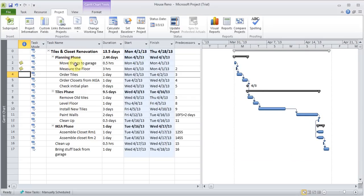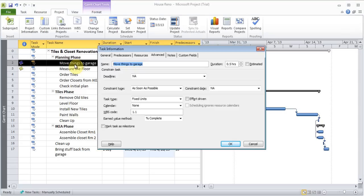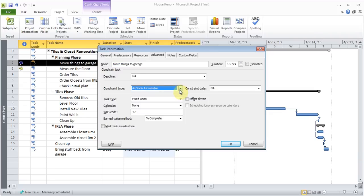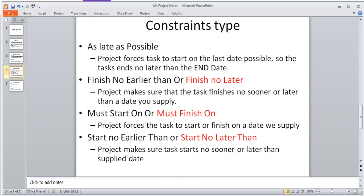And I'm just going to double click on one of these jobs, and under Advanced, there are some constraint types. And there are some different types of constraints. So we'll just talk about that briefly. I'll come back to my PowerPoint here. So in this, there are constraint types, like as late as possible. So it says project forces tasks to start on the last date possible, so the task ends no later than the end date.